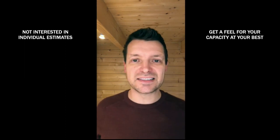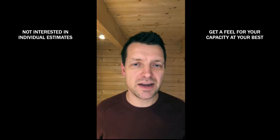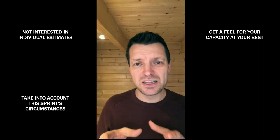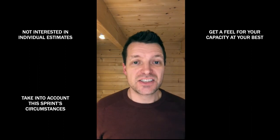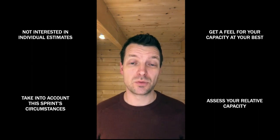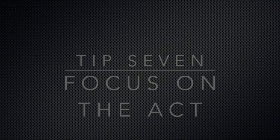So let's say if we take our three or four best sprints and we deliver, let's say, 75 units of product backlog, or 8 to 10 user stories, whatever it is. And this sprint, we've got a few holidays, we've got a bit of training, we've got extra support, or we're onboarding someone new, which means that we're not going to be as productive as normal, maybe about 80%, then we would commit to about 80% of that figure. Just having that conversation is a really important thing for a team to become more and more predictable and more comfortable and avoid overcommitting. Tip seven, focus on the planning, not the plan.